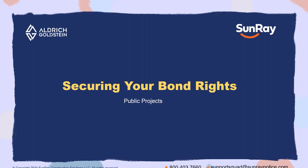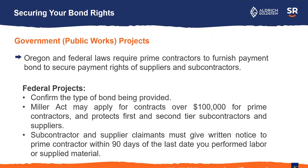You can't lien public projects, but you may have bond rights for public projects. Oregon and federal laws require the prime contractors to furnish a payment bond, and that secures the payment rights of suppliers and subs. If it is a federal project, you're going to be under the Miller Act, which came about in the 1930s as a way to ensure that lower tier contractors and suppliers on a project get paid. The federal Miller Act protects the first and second tier subs and suppliers, and it's for contracts over $100,000. If you have a claim, you've got to get notice within 90 days of the last day that you performed labor or supplied material.